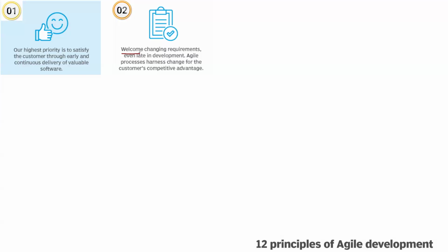But in Agile, no, you welcome changes. Even late in development, this is what I was telling you, day 1 or day 100, change doesn't matter. You welcome the change, you will study the change, and you see, is it valuable? Is it a high priority or low priority? If it's high priority, you implement it.